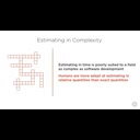Estimating product backlog items in complexity points rather than hours allows us to remove time from the equation and instead think only about how complex a given item seems. We'll then use those complexity points to forecast how much work we can do each sprint. Normally teams have a general understanding of how many complexity points they can complete per sprint based on the number of complexity points they've completed in previous sprints.